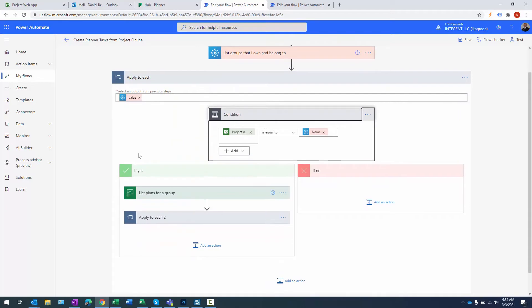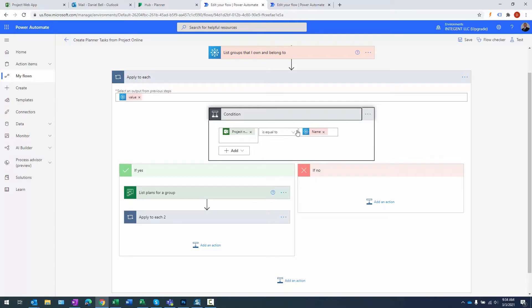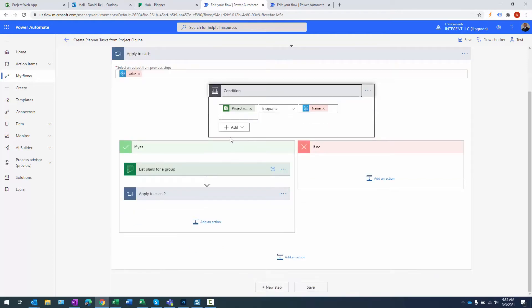After that, we basically iterate through the groups that I belong to, and we try to match the name of the group to the name of a project in Project Online. So basically what I'm looking for here is an Office 365 Group that has the same name as a project in Microsoft Project Online.